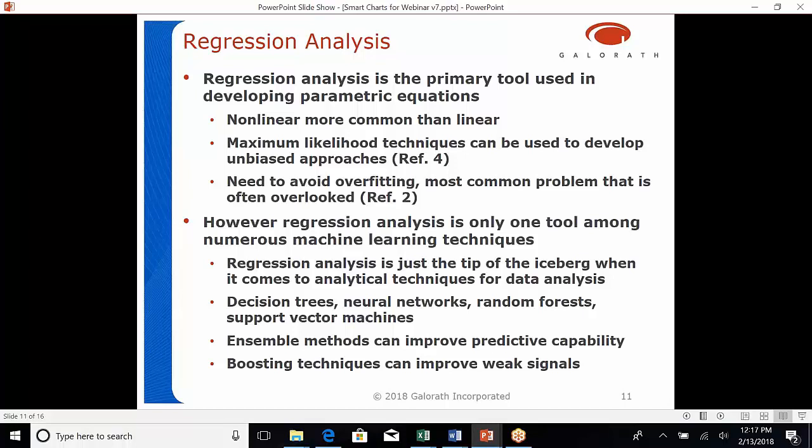However, there's substantial empirical evidence that the residuals are lognormally distributed, in which case log-transformed ordinary least squares is a maximum likelihood approach. You can also apply maximum likelihood to directly estimate those lognormal residuals and minimize them, and I've written a paper on this. That results in an unbiased approach directly, without the need for transformation, and it avoids the bias issue. So you can still do log-transformed ordinary least squares or that type of approach without any of the drawbacks.